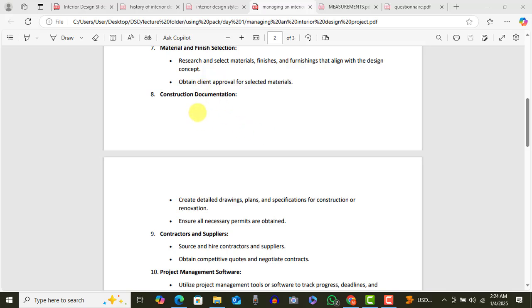So this is actually documentation, but I needed to chip in that before I talk about documenting it. Because in certain local assemblies, for you to do that renovation, for you to do that expansion, you need to get a permit. So if there's something structural you need to do, you need to get a permit and do your documentation. If you are lucky and they don't come after you, fine. If they see you and decide to worry you, they will worry you.